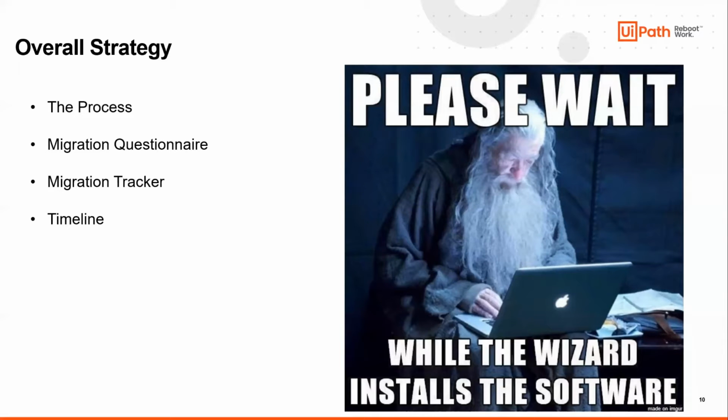So in terms of timeline, I've done migration projects that range from anywhere from 4 weeks to 3 months. It really depends on the availability of the customer, how long it takes to get access to their environments so that we can run the migration tools. It could also depend on the readiness of their environment. Sometimes they might need to upgrade to a supported version before we can start migration. In those cases, we would invite infra to assist with the upgrade alongside us before we execute the actual migration.